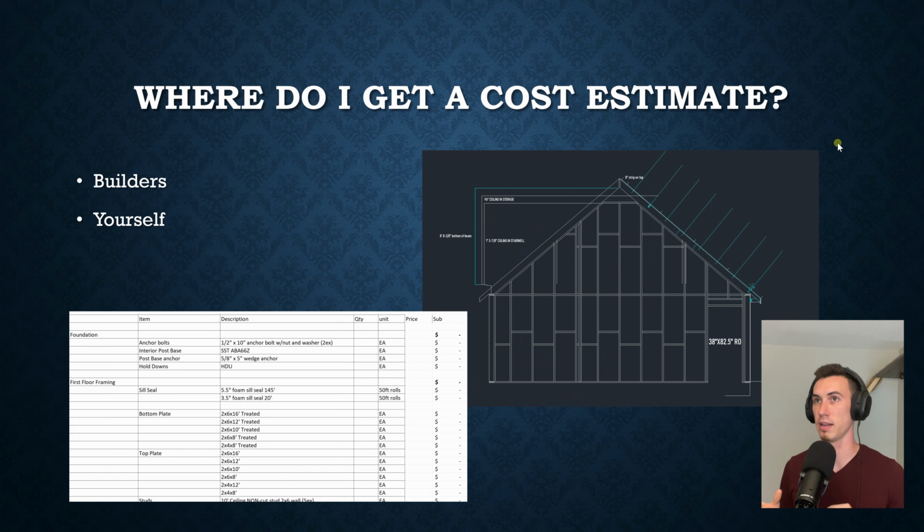Specifics of a house price are going to be based on average industry prices, typically, if you're going to build a pretty regular house and you're not going to do crazy details or any fancy building science stuff. Between those and pre-established budgets, like, hey, your bathtub can cost this much, your sinks can cost this much, they're going to be putting allowances into your budget. And if you go over those, and you want nicer stuff, then, hey, okay, you're going to have to fork out more.